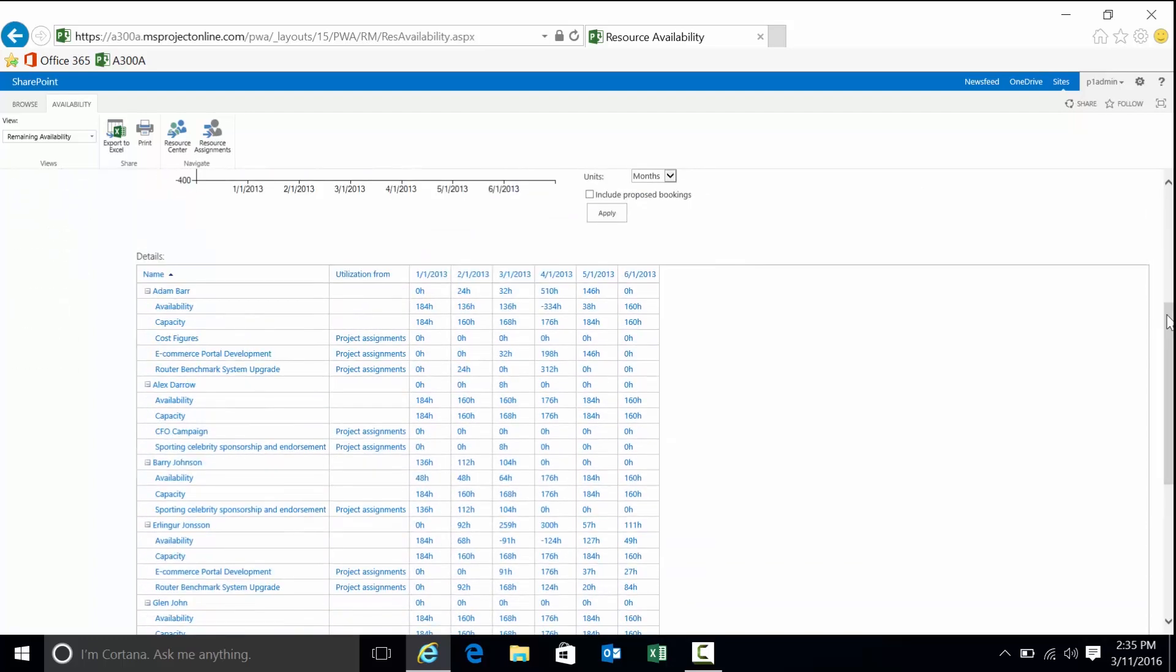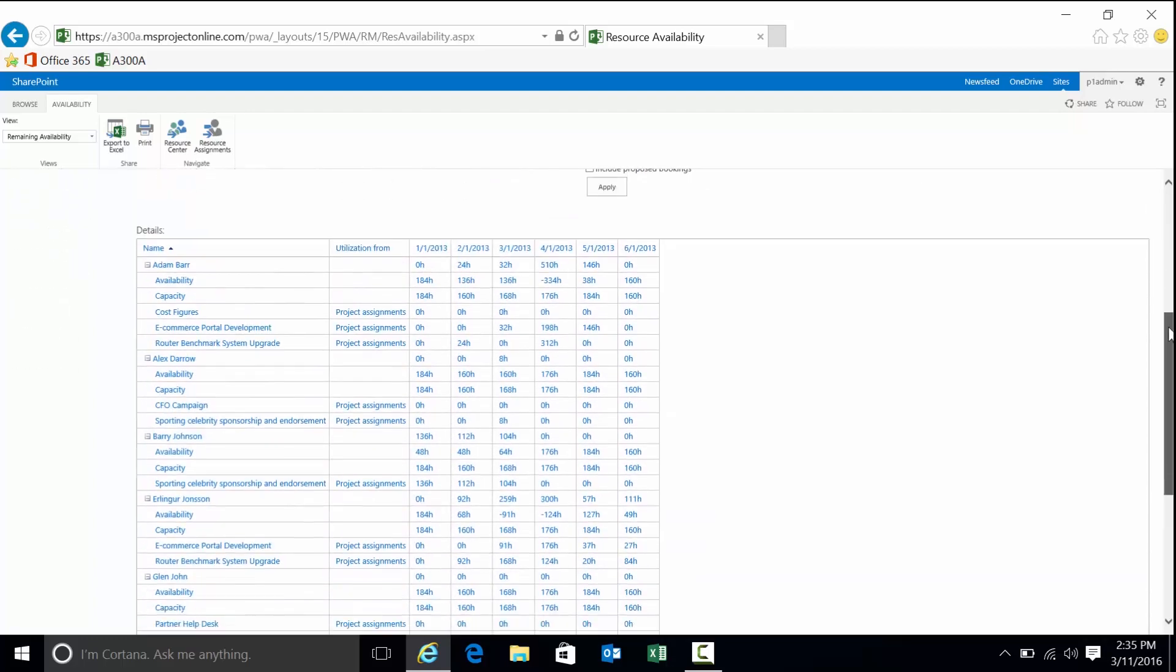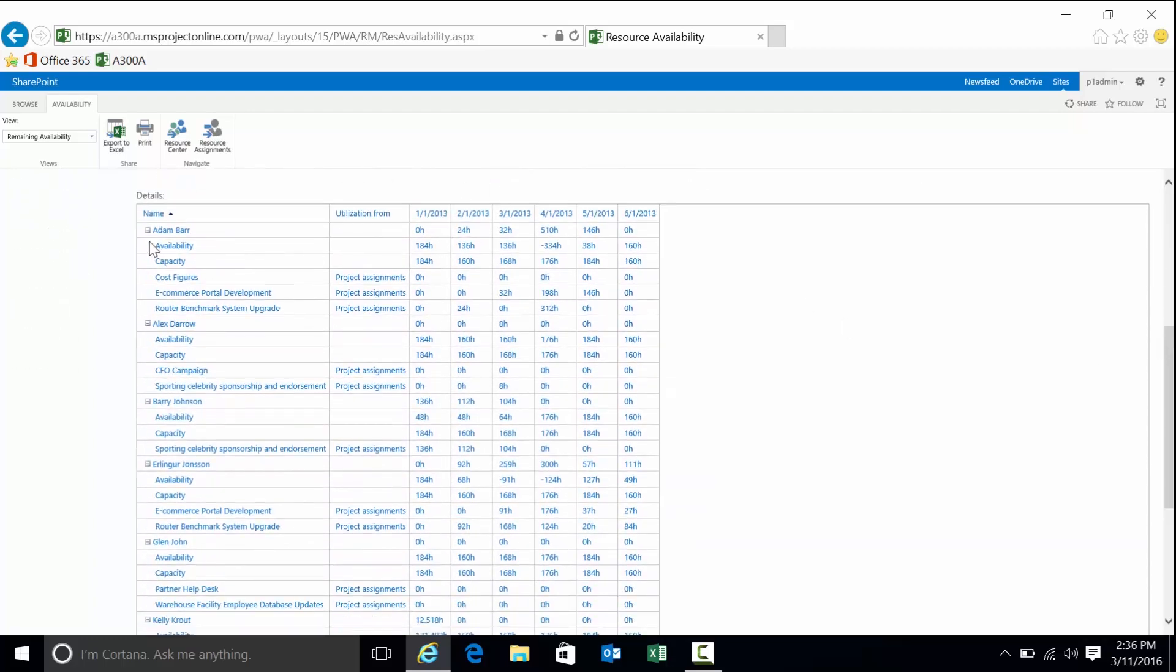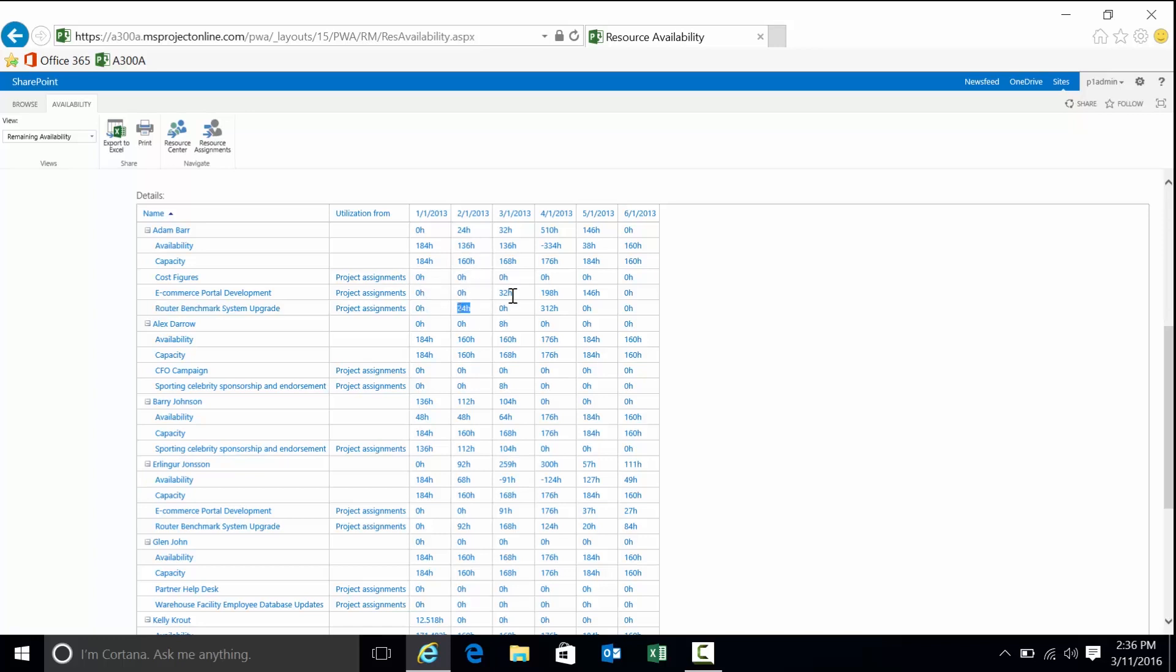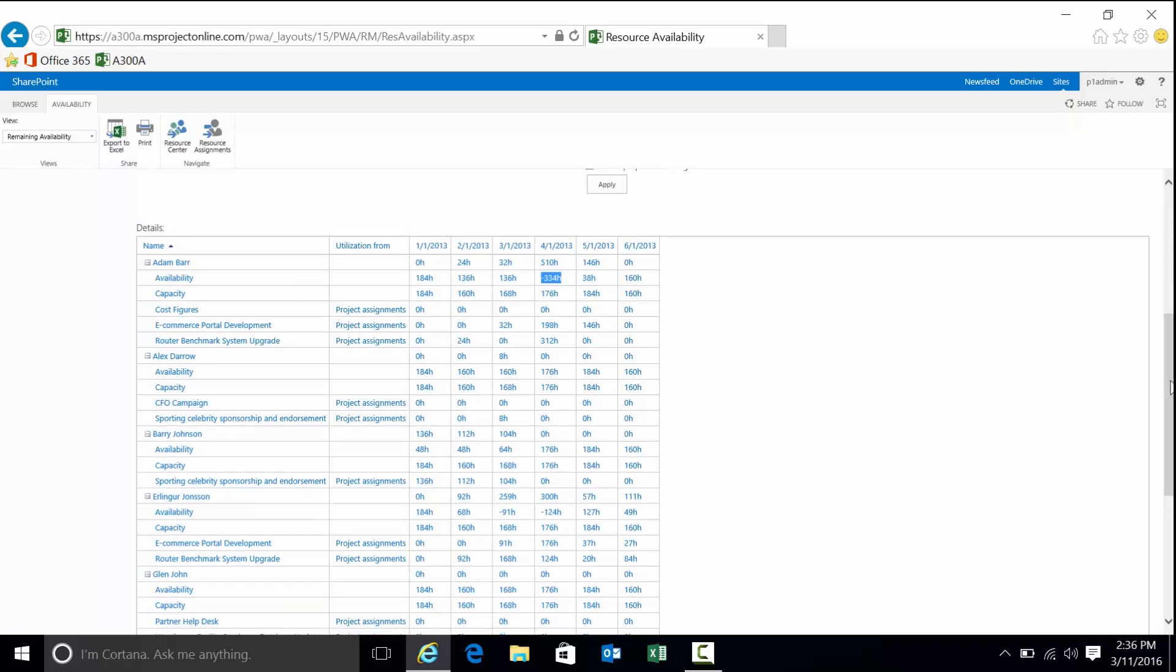When we get over here, it looks like maybe Barry doesn't have sufficient availability. It certainly looks like Erlinger is having some issues in this time period. And then when we get to this next April 1st time period, Adam's not doing very well at all. Good information. We want to find out more. I can come down to the lower portion of this particular screen. I can look at Adam's detail. This will get me down to the particular projects. I can look first at his capacity to do work, based directly on the calendar, not related to the projects he's scheduled to at all. Anywhere between 184 and 160 per time period. The projects he's assigned to are underneath here. We can see in the time frames here, 24 for that period, 32 for that period. We get to the 401 time period where you have the issue. We see one project with 198 hours and another for an additional 312 hours.